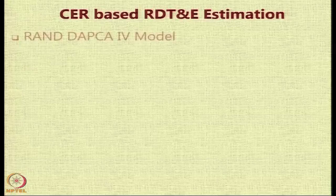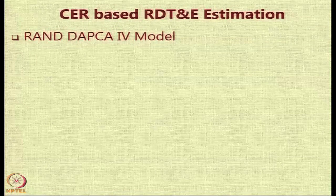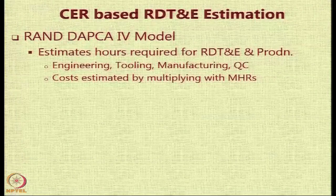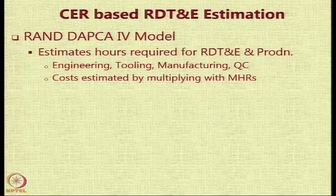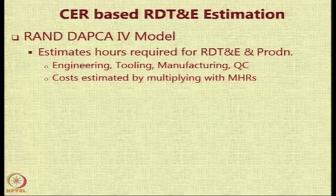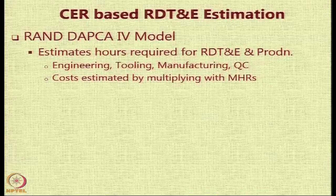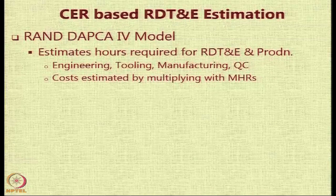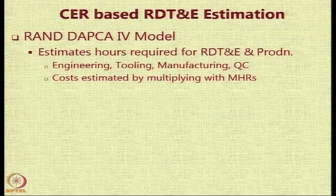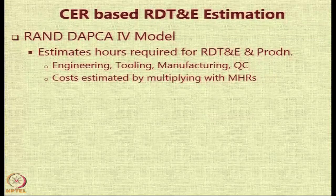When you do a CER-based RDT&E estimation, one very popular model is the DAPCA-4 model given by the RAND Corporation, which is also explained in detail in Raymer's textbook. In this model, one estimates the hours needed for various aspects of the RDT&E phase and the production of prototypes. These activities are divided into the engineering activity, the tooling activity, the manufacturing activity, and the quality control activity.